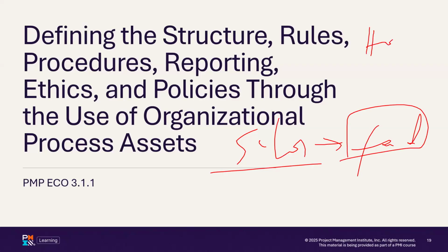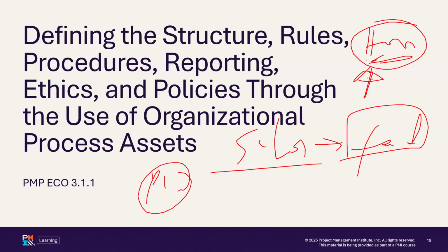Automatically, the head of finance becomes the project manager. Even if there is a PM in the organization, he or she will report to the functional manager. So mainly, what the functional manager wants is what gets done. That is what we call the functional structure or the silo system.